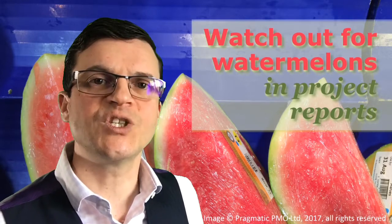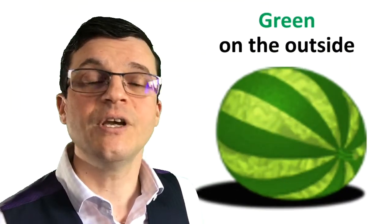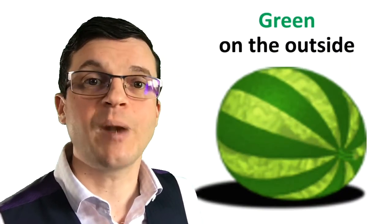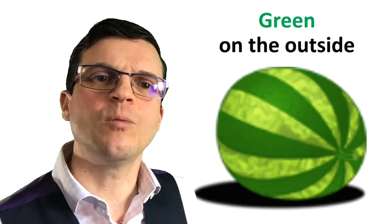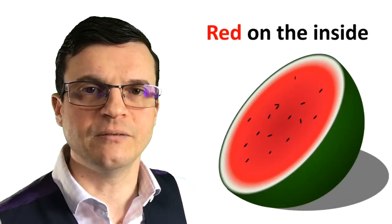Watermelon Reporting describes the phenomenon where according to a project status report everything is green on the outside so there are no problems and everything is going to plan. But if you delve into the detail what you find is that actually the project is red on the inside right through to the middle like a watermelon.